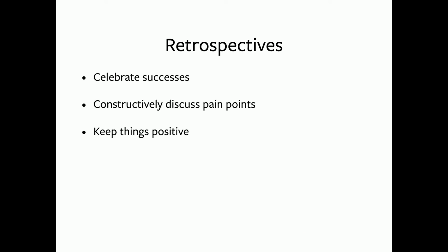And I wanted to talk about retrospectives a little more because I feel like everybody has this negative feeling towards retrospectives because typically it's all about what went wrong. Nobody wants to sit in a room and just talk about how you sucked. So what I like to do on a retrospective is come with a plan and share that plan with the team so everyone can be more comfortable with it. So the last one I did, I said, okay, we're going to talk about project management, design, and development. And I actually split the design and development talks out because I wanted to time box it. I didn't want it to have this whole day session.